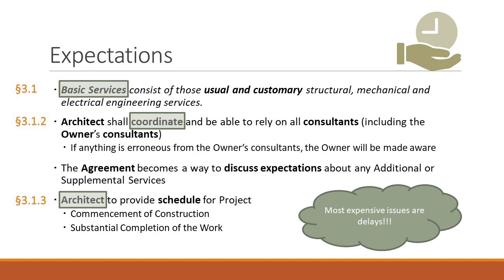Now, part of your basic services, you need to coordinate your services with the services provided by the owner or the owner's consultants. So I think I've talked about in the past, use this example, let's say you're designing for them a hotel, and the owner wants some specialty kitchen where they're going to have some star chef that's going to come in. They were able to bring in somebody from Top Chef or what have you, and so you want to have a showcase kitchen. Well, the owner may say, I'm working with Stephanie Izard, she's here in Chicago. She is Girl and the Goat and a couple other restaurants. I'm working with her. She wants to have the restaurant designed the way she wants it. She's got her own restaurant designers.